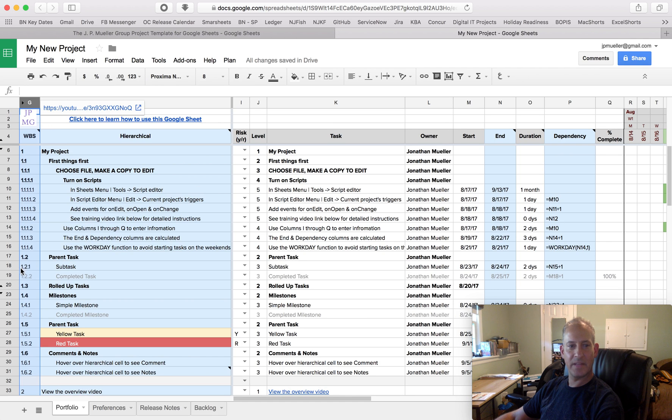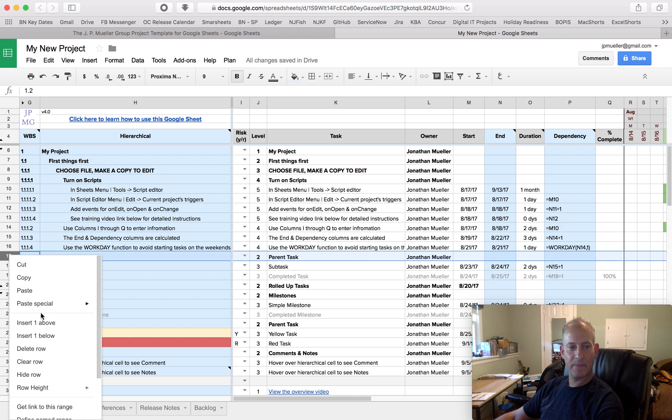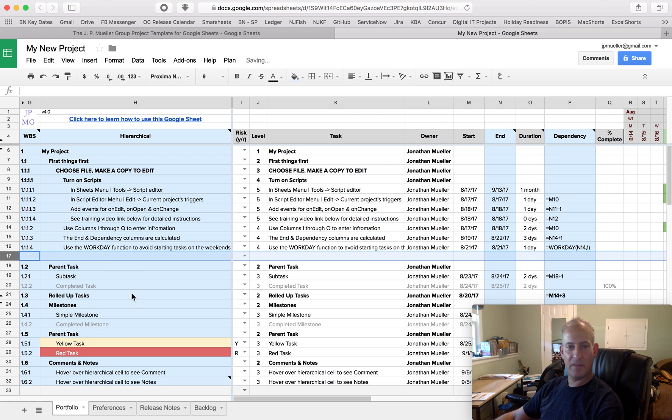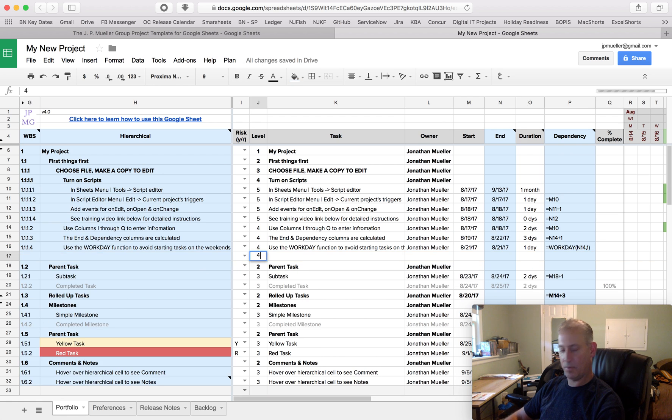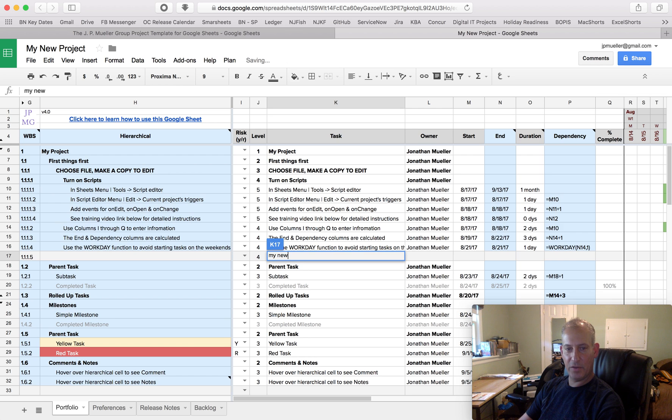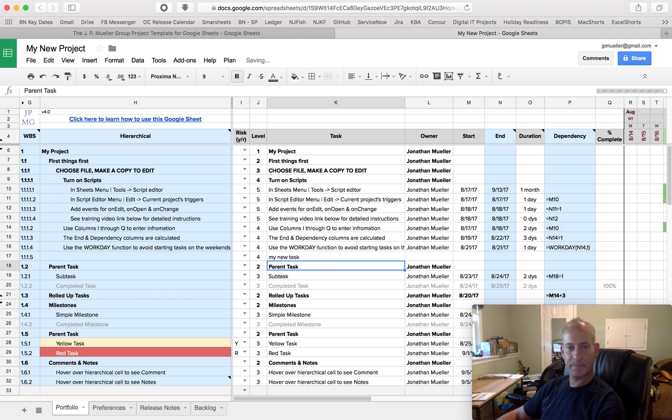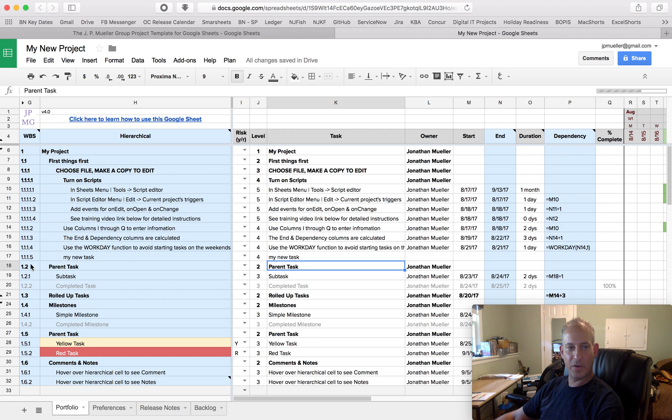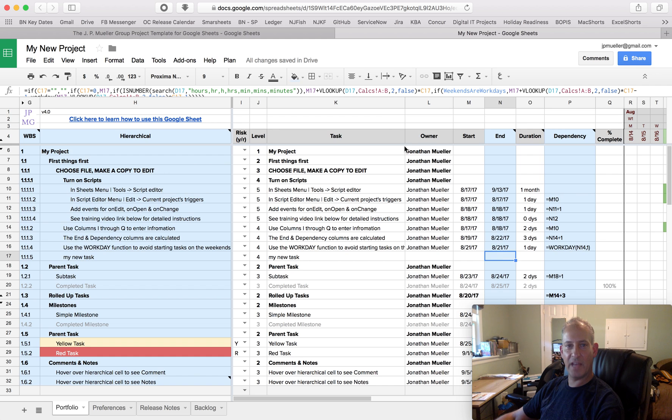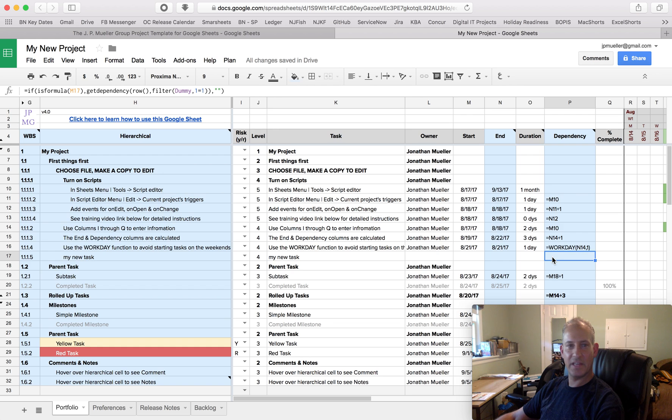Now let's go insert that line again. Insert one line above. I'm going to put my new task. And let's see what happens here. Notice the work breakdown structure is there, meaning the formula has worked. And if I hover over the end column for that row, you notice the formula exists. And the same thing for dependencies.